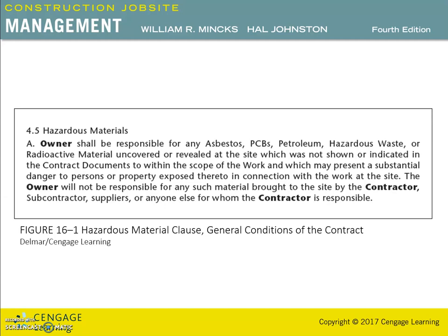If the owner chooses the option to hire an outside contractor as allowed in the specification, the original contractor may request a change order for the costs and time associated with the necessary delay or for remediation work.